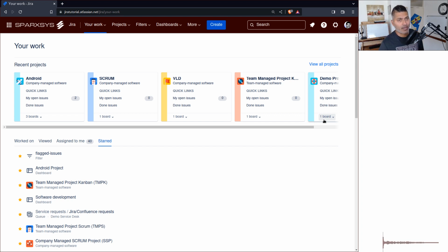Now, if you create the hierarchy in Jira, of course, if you're using the premium plan, there is a hierarchy. There is something that you can modify, and epic, story, subtask is something which is fixed. But on top of Epic, you can create something like a feature. On top of feature, you can create something else, like maybe initiative. Now, you may want to have features in between Epic and stories, right? And that means that you need to modify the name of the Epic. So it is something that you can potentially do, but I will not recommend it.